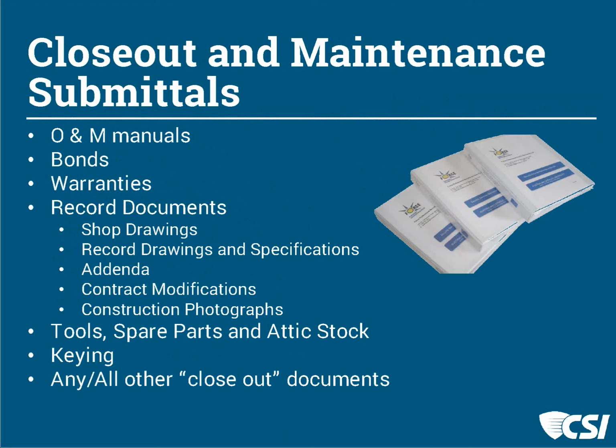It might be a copy of the final certificate of occupancy and those types of documents that are used to conclude the project and make final payment. These are more related to the owner's operation of the facility. They may be in these binders that remain at the job for facilities maintenance personnel or operations people, facility management people to use at the site.